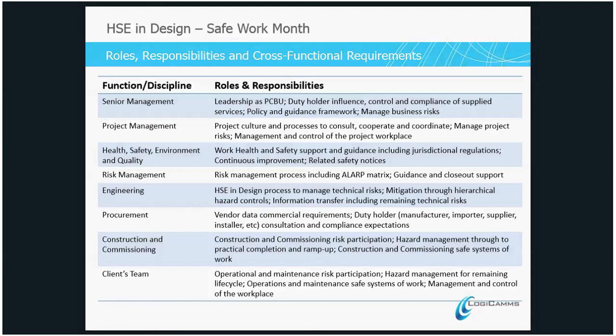Construction commissioning, so we need to get participation where we can from construction people who are inside the company, and also those construction companies that work with us, so that the hazards that we're aware of can be managed right through from the construction phase to practical completion and ramp up, and that the construction and commissioning components have the correct safe systems of work, and they understand the dangers that may exist or hazards that may exist with the design in terms of the construction perspective.